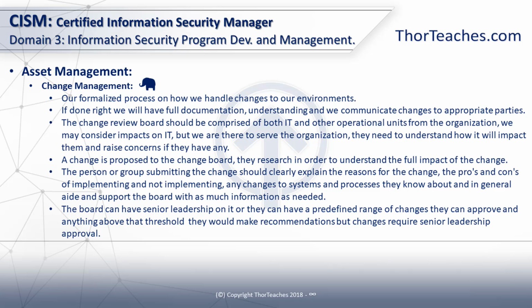And the process here is very similar to a regular patch, but the change could have been IP changes, or added equipment, or whatever we're changing in our environment. It is also possible for the board to have someone from senior leadership on it, but in most places I've been, senior leadership is too busy. They have a range of things that the board is allowed to approve. If it's just regular operations, or within these certain parameters, then as long as the entire board approves it, go ahead and make the change. If for some reason there's something out of the ordinary, something that we don't normally see, and maybe doesn't fit within those guidelines, then senior management would get involved.